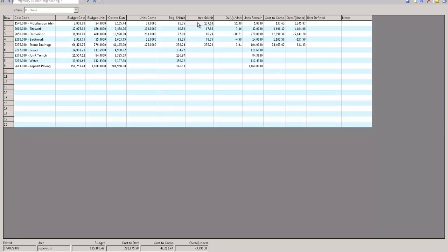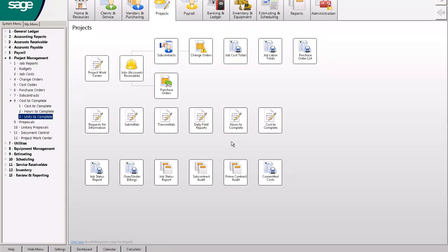You're going to know your unit cost by task of work. Are they always comparable? Maybe not, but they're going to be similar. If I'm not hitting that budget consistently, I've got to look at my field operations or I've got to look at my estimating efforts. One of them is wrong. And so that's what this is going to provide to you. A nice little forecast. I'm going to close that real quick.